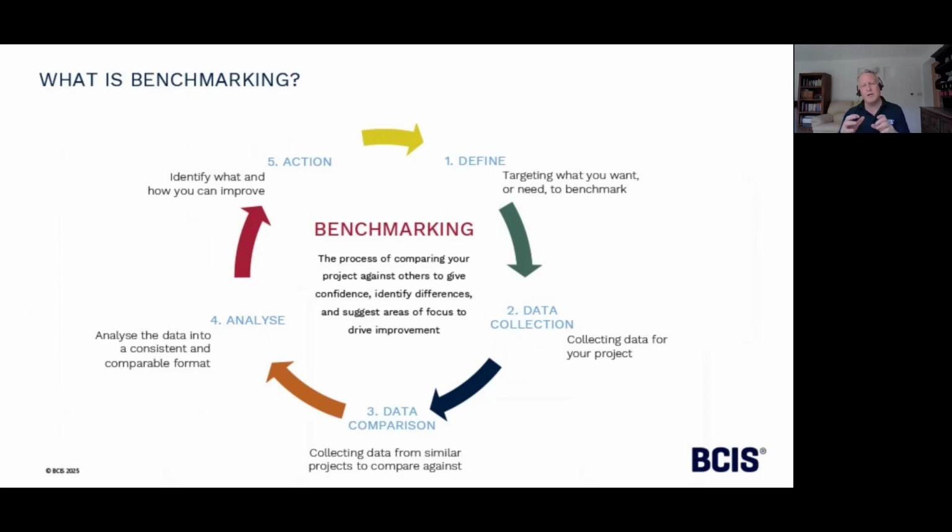And benchmarking is very, very easy in terms of its steps. And Harry is going to be going through this in his video a little bit later. But in the main, at a very high level, you define what you want to benchmark, what you want to identify and compare. You then collect a load of data on your project. You then collect a load of data on other similar projects. You then analyze that. You identify what actions you want to make at the end of it, and then you carry on.